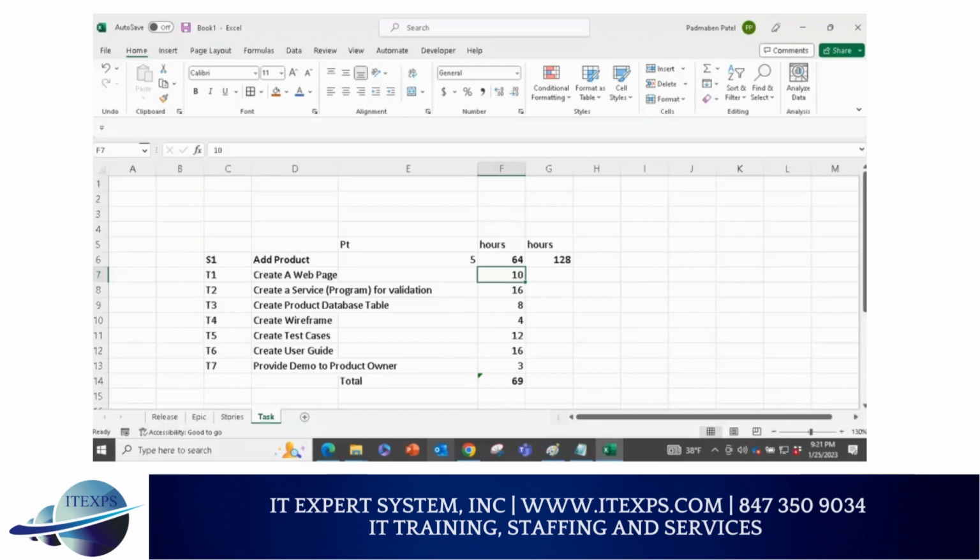I would start assigning tasks at least for one story. So next day, they should not ask, what am I going to do? They should not even be asking because they have a clear agenda. When they come Tuesday, they start working. At least you should plan for one story. Make sense or no? I'm not planning all because I know it will change. But at least you should plan because if they come tomorrow morning, maybe early, they should not wait for you.